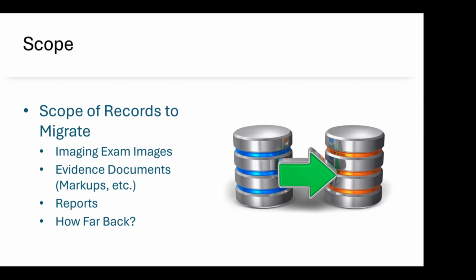And often when it talks about retention, or are we going to migrate all this data, what I've encountered is a lot of organizations struggle to answer the question: who can or will decide and put that decision in writing to not migrate some data and permanently delete it? So oddly enough, the policy decision, in my experience, often is not that somebody decided, hey, we're going to keep everything. It's that they can't figure out who has what authority to say we're going to permanently delete a bunch of old medical records. So the de facto decision is migrate everything and pay for that.